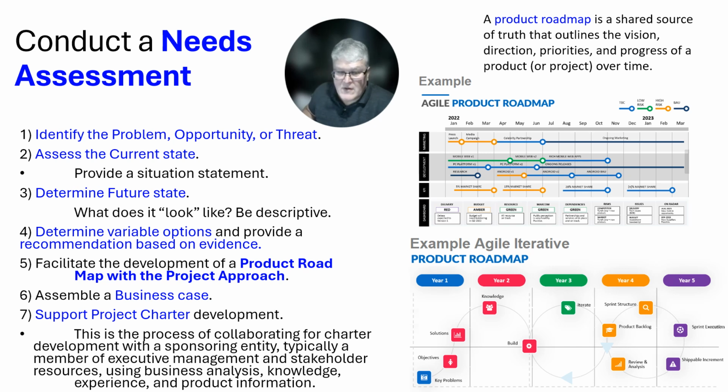Next thing, you determine what a future state would be. So if you have a gap, an opportunity, or a threat, what would occur that would say, okay, we're operating optimally and we've remedied the issue that's been involved. You would be descriptive when you talk about this. So you would paint a picture with words to identify what the future state would look like. Next, step 4, determine viable options and provide a recommendation based upon the evidence that you've provided.